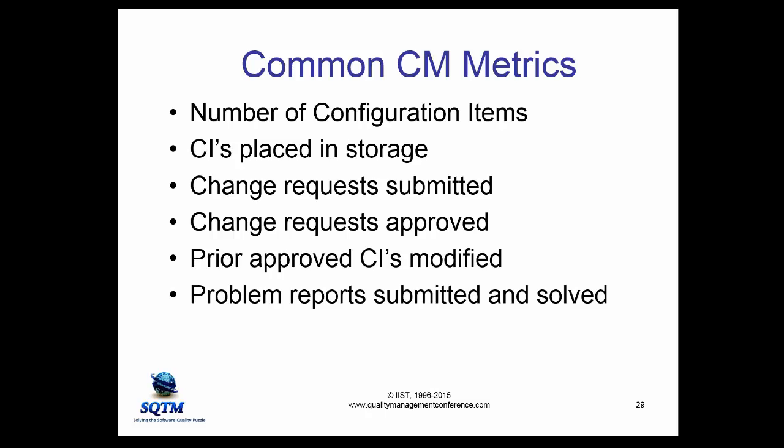Problem reports submitted and solved. So after a system goes into production, you've got problem reports. When the problem report comes in, it goes to configuration management with a request to check out a configuration item, the latest version of the configuration item, so that they can start solving the problem.